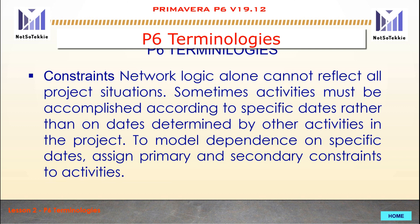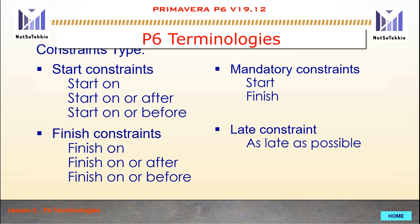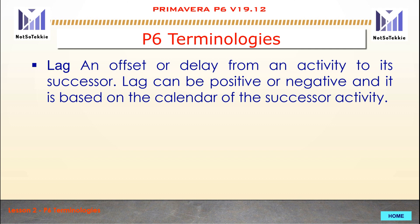Constraints: Network logic alone cannot reflect all project situations. Sometimes activities must be accomplished according to specific dates rather than dates determined by other activities. To model dependence on specific dates, assign primary and secondary constraints to activities. The constraint types are: Start Constraints, Finish Constraints, Mandatory Constraints, and Late Constraints. Lag is an offset or delay from an activity to each successor. Lag can be positive or negative and is based on the calendar of the successor.